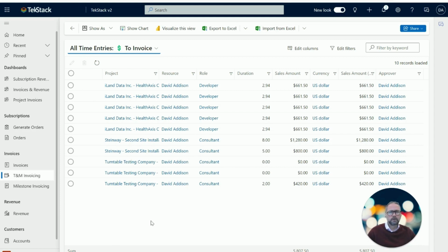So typically somebody in accounting or some sort of professional services revenue kind of role, usually accounting though, will look at all of this, just to review that everything looks right. So they'll make sure the right rates are applied, or make sure that, let's say, certain time entries don't exceed budget.